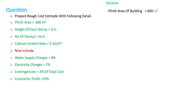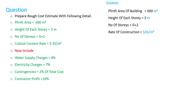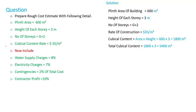Now let's go for the solution. Plinth area of the building is 600 square meters. Height of each story is 3 meters, and the number of stories is ground plus 2, meaning 3 stories. The rate of construction is $35 per cubic meter. The cubic content per story equals 600 square meters multiplied by 3 meters, giving us 1800 cubic meters.